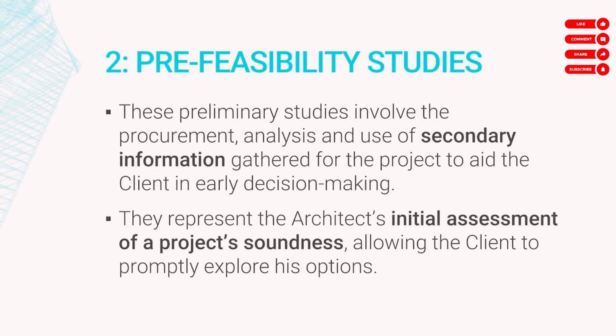Assuming it's happening pre-design. Next, the second pre-design service is what we call the pre-feasibility study. Iba pa yung feasibility study. Okay, ito is pre-feasibility study. These are preliminary studies involving the procurement, analysis, and use of secondary information gathered for the project to aid the client in early decision making.